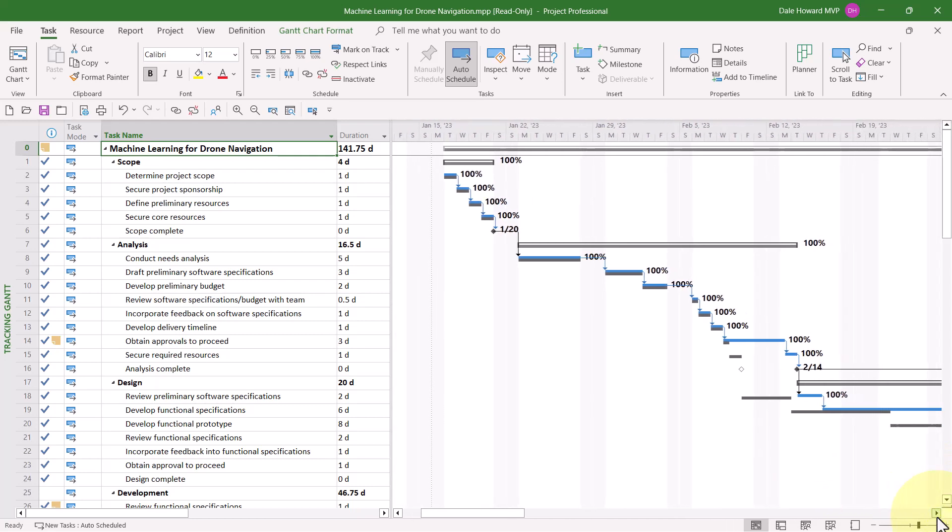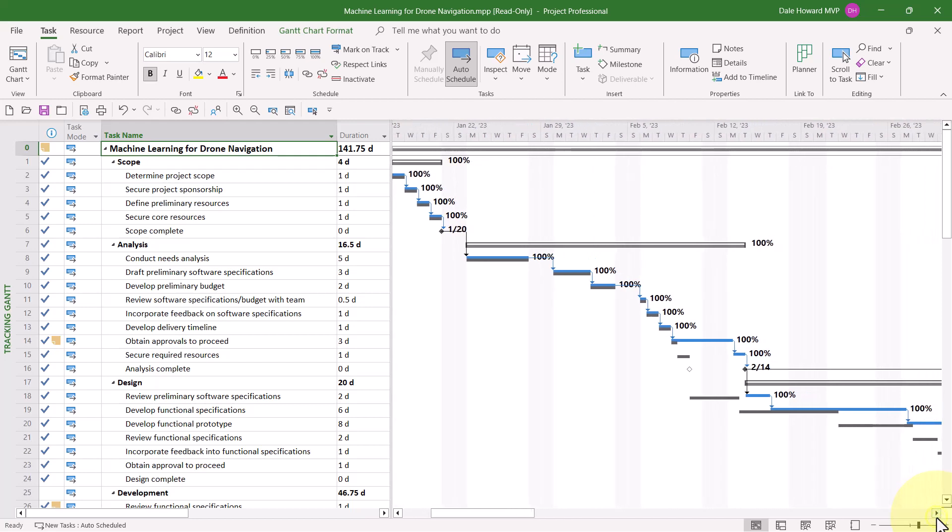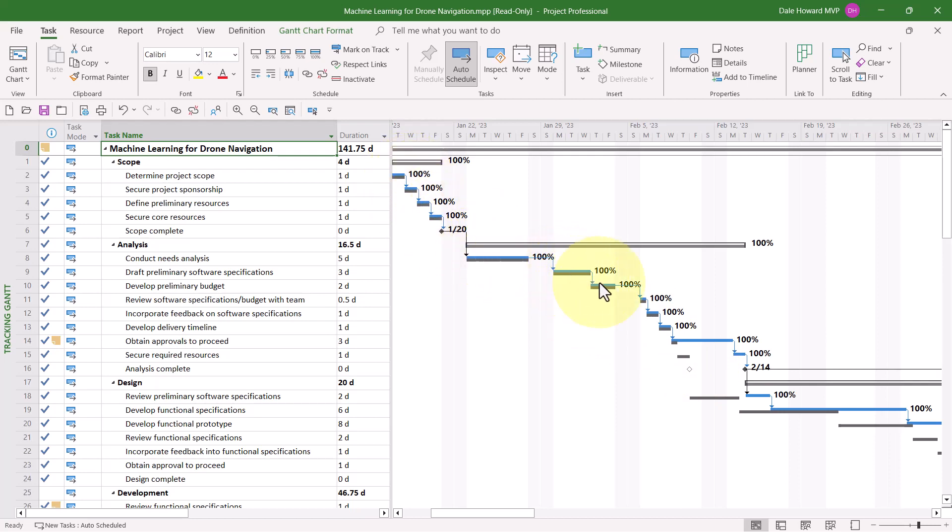The way to analyze variance in the Tracking Gantt view is to compare blue and red Gantt bars against their accompanying gray Gantt bars. For example, early in the schedule, the Gantt bars are identical. The length of each is the same. But then notice this Gantt bar extends far to the right of its accompanying gray Gantt bar. This indicates slippage.